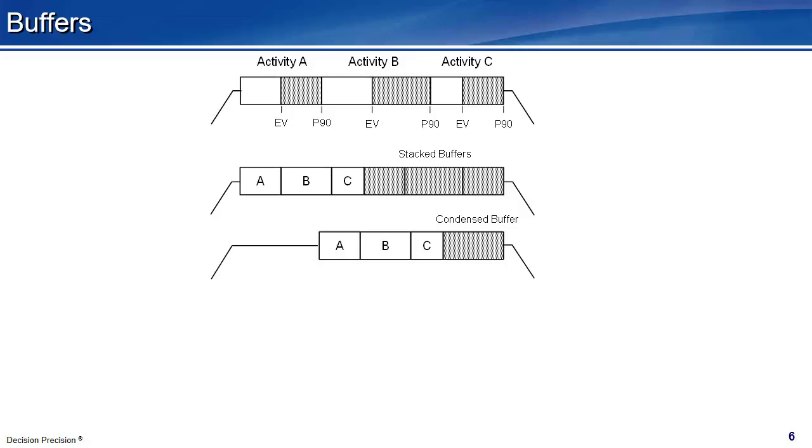We can model whatever scheduling logic we think is appropriate. In my model, competition for the resource and its availability are important. So I will mostly use ASAP logic: begin as soon as possible. However, a scheduling tool is to safely schedule activities' earliest starts. An activity can start as soon as predecessors finish, other schedule constraints are satisfied, and the resource is available.